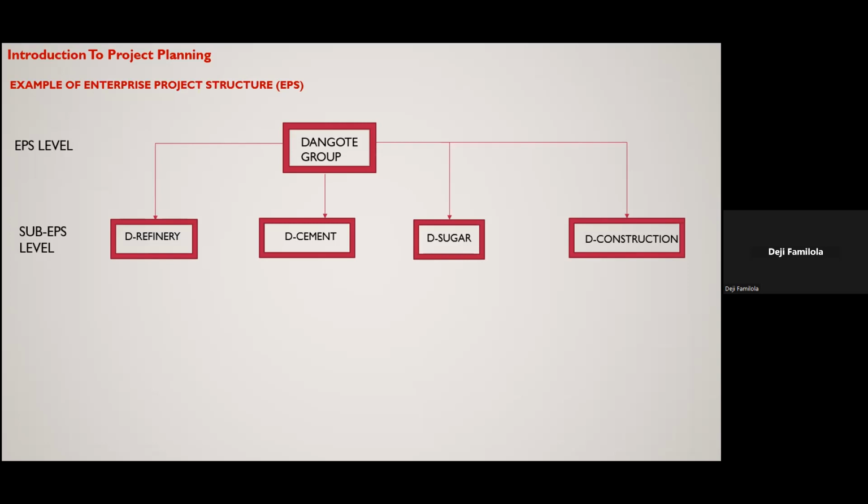These guys will be going on holiday, so we won't assign any job to them. So all their jobs will be moved to the right, or probably brought forward, if they can do it earlier, then they do it earlier. But then John came, he needed to go on holiday as well. But from the beginning, we didn't plan for John to go on holiday at that point.